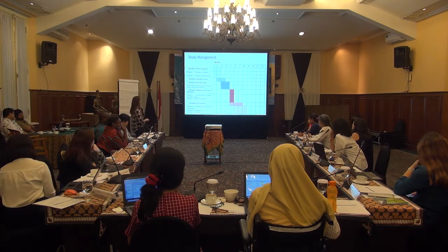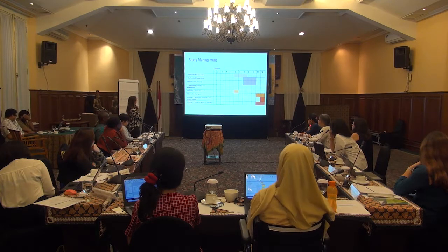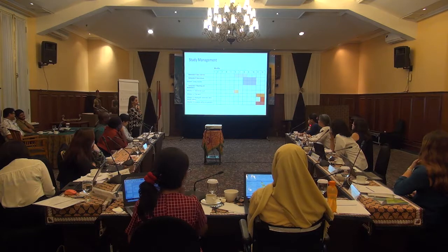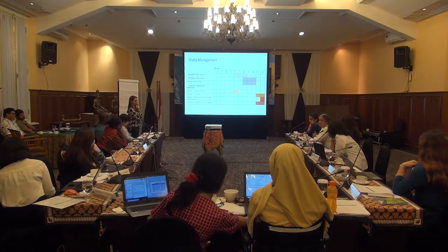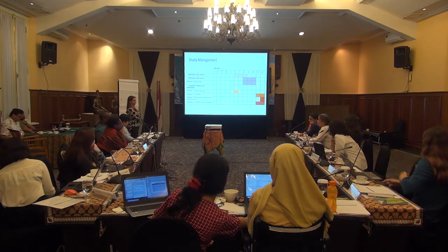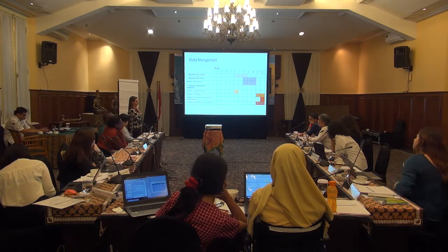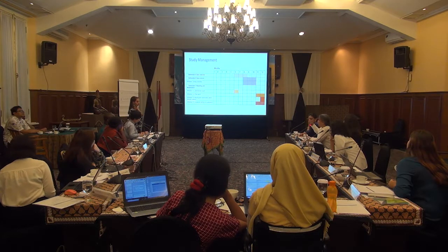Can you go to the next one? So here again, because you're doing a qualitative study, I don't think you can wait until the 3rd month to be doing your analysis. I always hear this from Dorothy, sitting with her in so many GHRPs, how I've learned qualitative studies. She always says that they go in parallel. This morning as well she said, it's an iterative process. You can't have a horizontal data management plan. It's always a circular one.